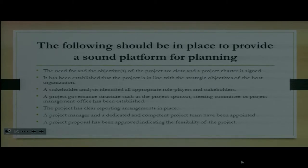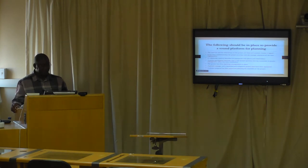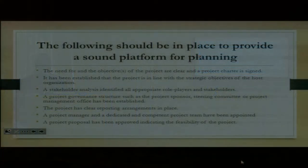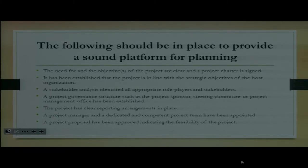Number three: a stakeholder analysis has identified all appropriate role players and stakeholders. A project governance structure such as the project sponsor, steering committee, or project management office has been established. The project has clear reporting arrangements, and a project manager and dedicated, competent project team have been appointed. A project proposal has been approved indicating the feasibility of the project — you cannot start planning unless it has been approved as feasible.